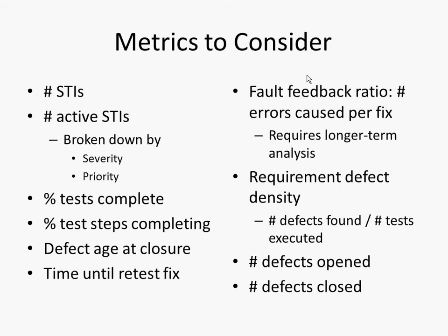What does priority capture in addition to that? It takes into account severity, but it also takes into account what? Well, that could be factored in there. Often that's not factored into priority, and that's instead folded into the triage process. It may be a higher priority, but you decide this is not worth fixing, and that's not captured in the priority score. But a team could decide to capture that. But what other critical piece of information besides severity? Frequency of occurrence. What's the likelihood this will really bite a user? Right?